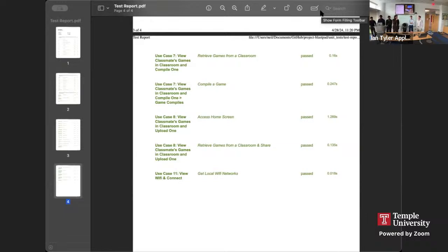How would the difference between the 2 week and the 1 week sprints be? We've had a lot of debate. There were some times where, with 2 weeks, the entire scope of what we were working on changed halfway through the sprint, and then our 2 week plan falls apart. So maybe the 1 week would have allowed us to change things more dynamically and on the fly, especially where we had a lot planned out but had a lot to change in the UI architecture.